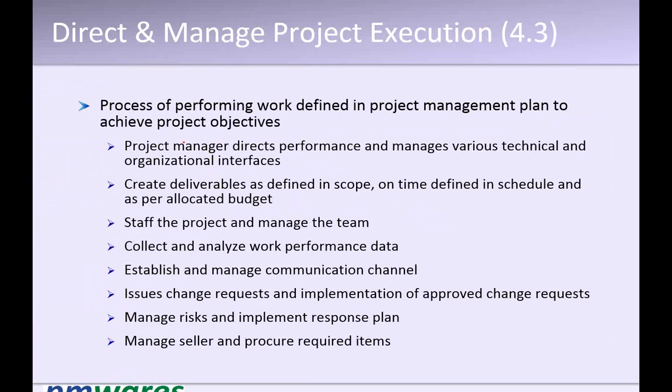A little correction I will do. Checking quality, schedule variance, and cost variance are part of monitoring and control. We do not compare in the execution. The thin line is there because they happen in parallel, all the time, but that is not part of the execution actually. Checking the quality is quality control, which is part of monitoring and control. Okay, I got your point.